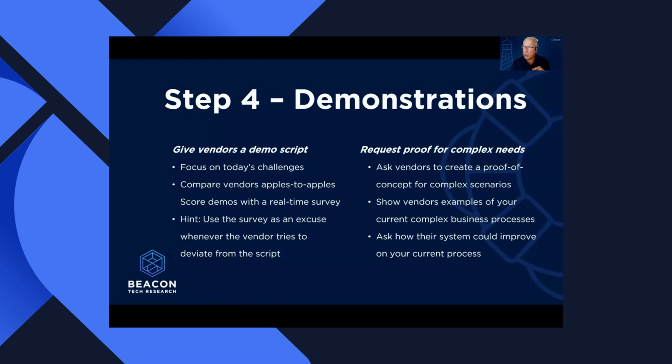And create a script, and you might even script things that the vendor can't do. So I always put a little disclaimer at the end saying that if your system isn't capable of doing these, please show us how you would recommend accomplishing this task using your system, or the best way to use your system to accomplish this task, and let them come up with the solution. You might be surprised.